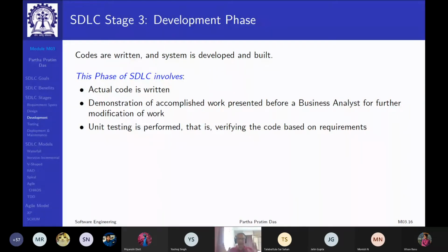So the business analyst is somewhere in between, a group of people who understand the domain where the product has to be built, and at the same time understand the broad perspectives of what you are building. So whatever components you made, you may want to present before the analyst, give a demo, maybe trial runs, and get feedback for modification right here. Because if you do not do this, then at a later stage, when a lot of things have been done, you'll be in real difficulty making the changes.